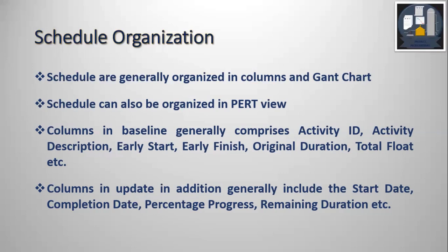For the update, there are some additional columns: start date, completion date — which may be the actual or forecasted start and completion — then percentage progress of each activity, and as the activity progresses, what is the remaining duration. These are the additional columns, and this also varies.